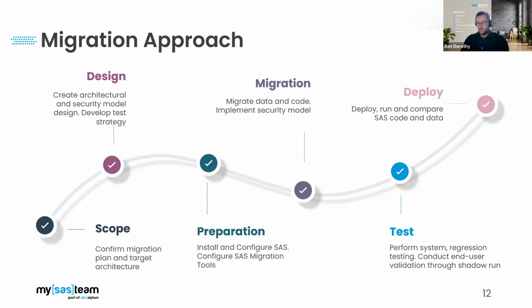Once the preparation is done, we move into migration. This is where we migrate data and code into the target platform. We also implement the security model at this phase as well, ready to be tested. Now, during the testing phase, we perform testing on our tools which prepare and migrate the components. This is activity that we provide as part of our service, and then we tailor the test strategy to the needs of the client.